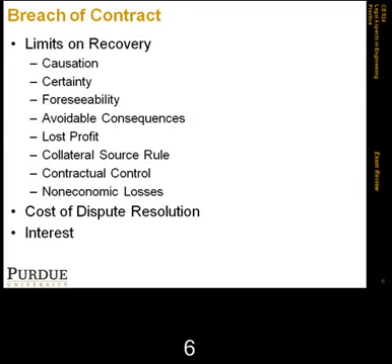First, the amount has to be easily determinable by computations based on standard contracts. So you basically have to be able to determine exactly the amount that should have been paid, upon which interest is being calculated. Second, the party could have avoided paying the interest by paying the amount due at the time it was claimed or requested. And third, unless the amount is known, the payment cannot be made. So why would someone be liable for interest if how much they needed to pay was not known at the time?